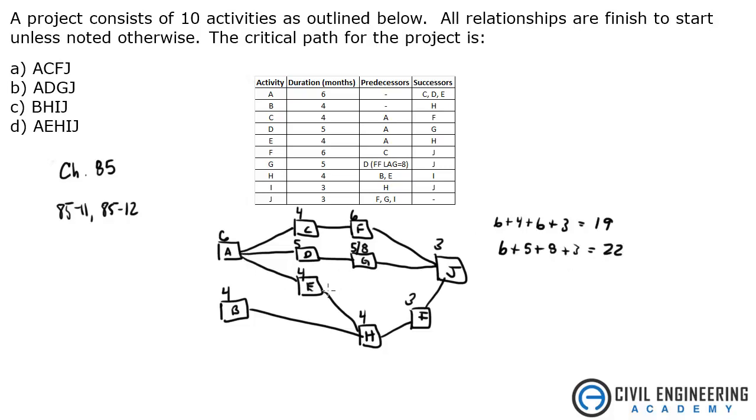Okay. A, E, H, I, J. That's six, plus four, plus four, plus three, plus three. That's 10, 14, 15, 16, 17. That's 20, 20 days.